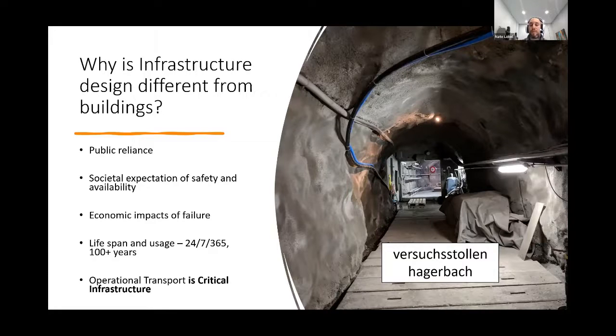During our trip, we spoke to one such person who was using the tunnel to teach their team of contractors how to line a tunnel, because they had been awarded a 30-year contract to line an existing metro system in a city in Europe, where the existing system is just bare rock walls in the tunnel, and they need to line it to increase the lifespan of the system, but they refuse to shut down the system for any period of time.